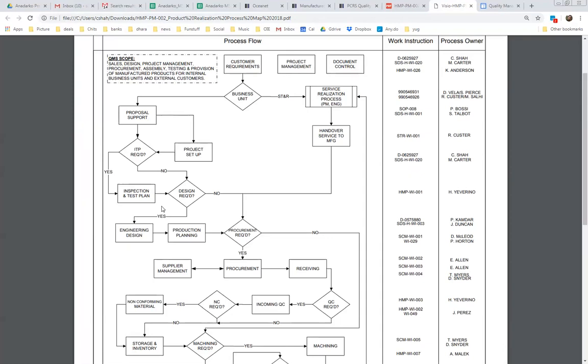One typical thing over here, which is not for any other group: once we test it, we disassemble the parts for coating. We don't coat the parts and then test it. We actually disassemble, so disassembly and coating happens. You get the things coated. If it all goes through, then you reassemble it, and then the project is closed out, and so on. So in summary, that's the flow of it.